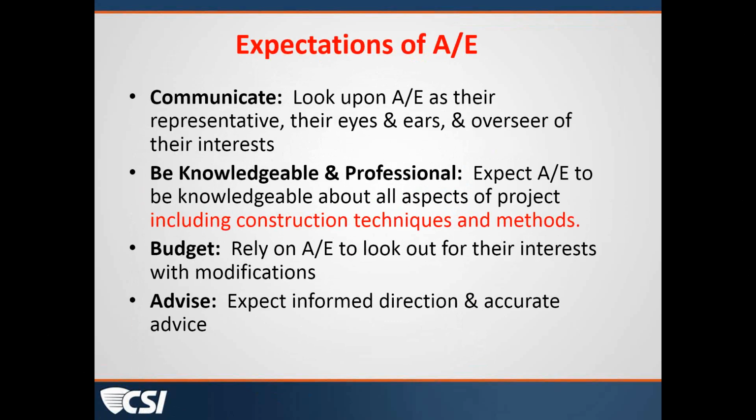Jim, before we move on, just a comment on this fact pattern that noted that there was not sufficient time to do a quality review, quality control, quality assurance review on the documents. We've all been there, where we've had projects with deadlines and you've got to get the drawings out the door and you have not done a full effort in checking the drawings. I would encourage you, even though the drawings are out the door and in the hands of the contractor being permitted under construction, to go ahead and do that quality review anyway. The sooner you catch it, the less costly it's going to be to fix it. It's easier to fix on paper than once it's built.